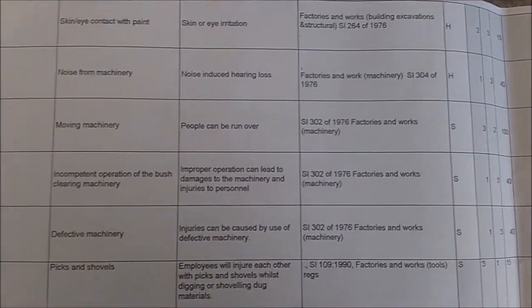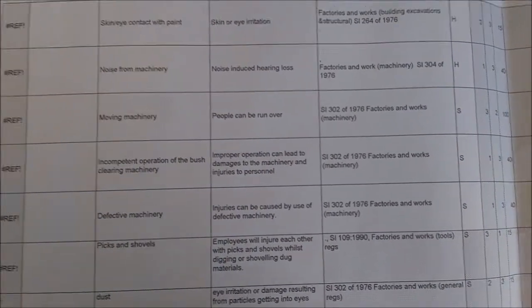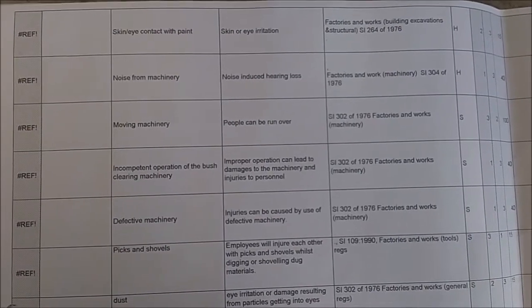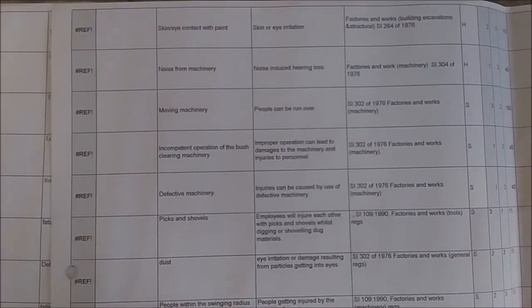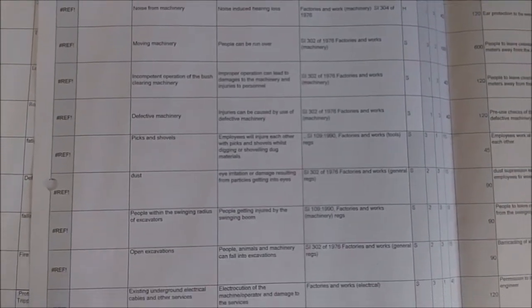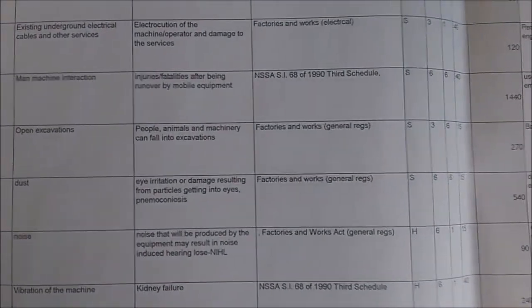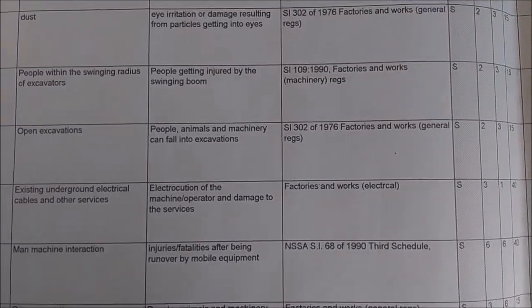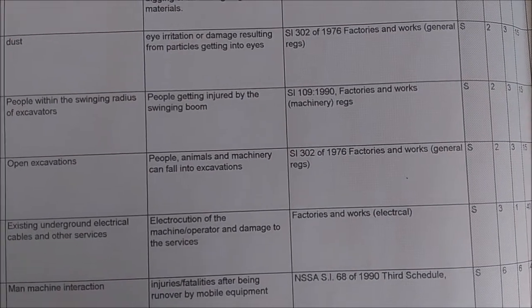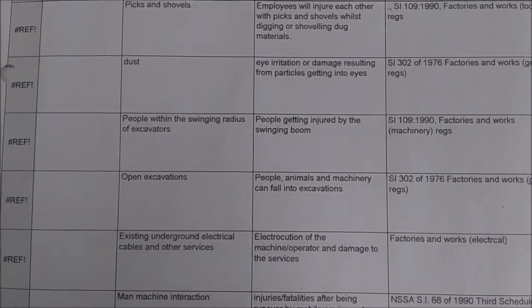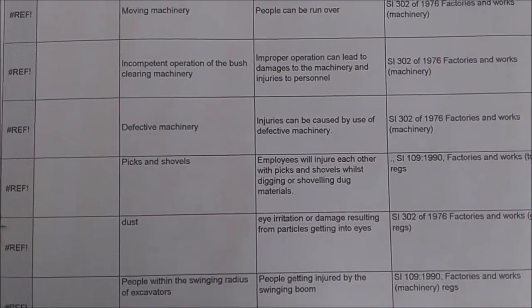It is very important to take your time doing this risk assessment. Sometimes there's no strict order, but it is valuable to impose one — this risk assessment started with site establishment, then surveying of the land, then earthworks, then construction works, through to commissioning. I'll leave a link to a previous video about exposure, frequency, and consequence so you can see how those figures are put in place and calculated.